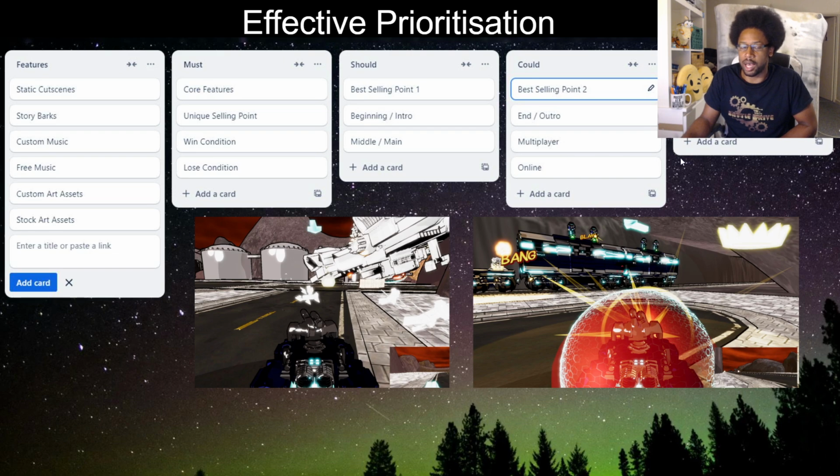Second reason, if you have that extra time at the end of a project and you think you can squeeze in one more task, you have to take into account regression errors, integration errors, last minute bugs. You're likely going to break your project, or you'll end up adding a feature that is low quality.